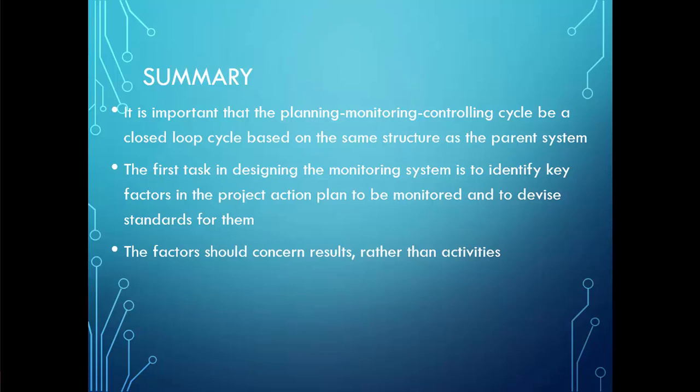The first task in designing the monitoring system is to identify key factors in the project action plan to be monitored and to devise standards for them. The factors should concern results rather than activities, and this is a very important issue because we need to look at the results of what's being done through the project progress.